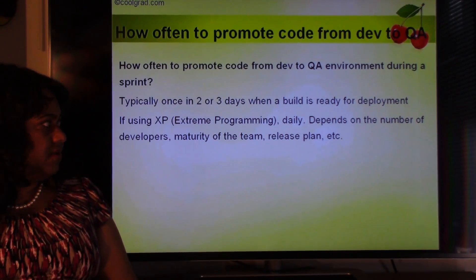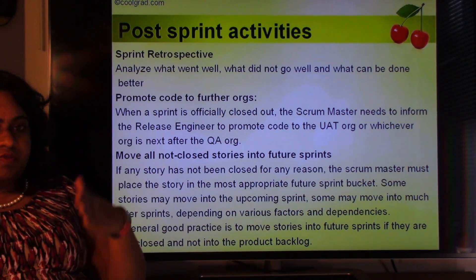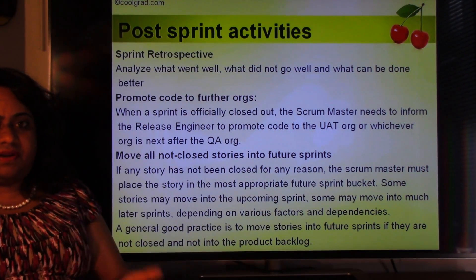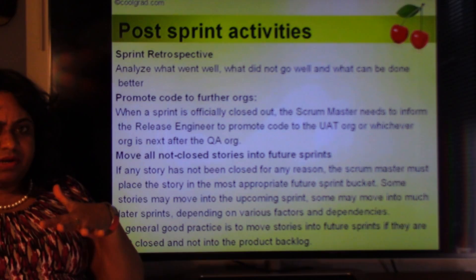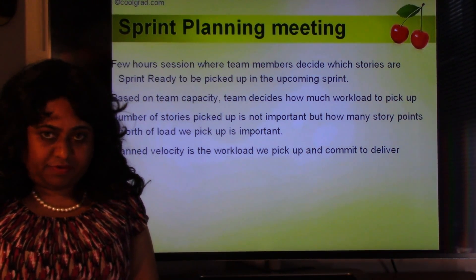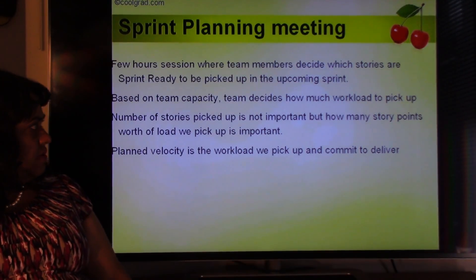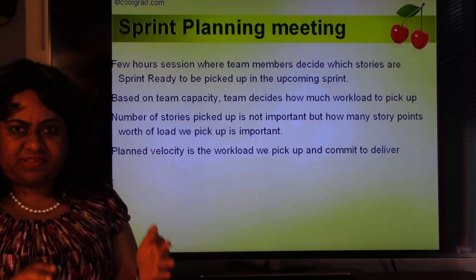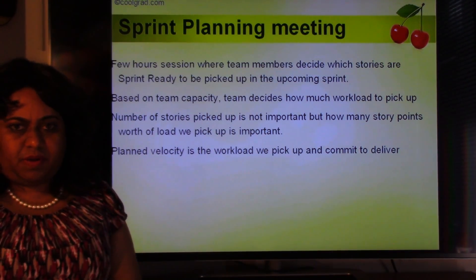Sprint exit criteria: The Scrum Master determines when a sprint is officially closed out. For a sprint to be done: the sprint demo and sprint retrospective must be completed; all test cases and test steps have been executed; the code is stable in the QA environment; defects have been logged for every failed test case and addressed appropriately; product owners have tested the functionality and are happy; sprint demo is done; sprint metrics have been published; and the retrospective is done. The code also needs to have been migrated to the specific environment where the client can test it. Then the Scrum Master says the sprint is officially closed.